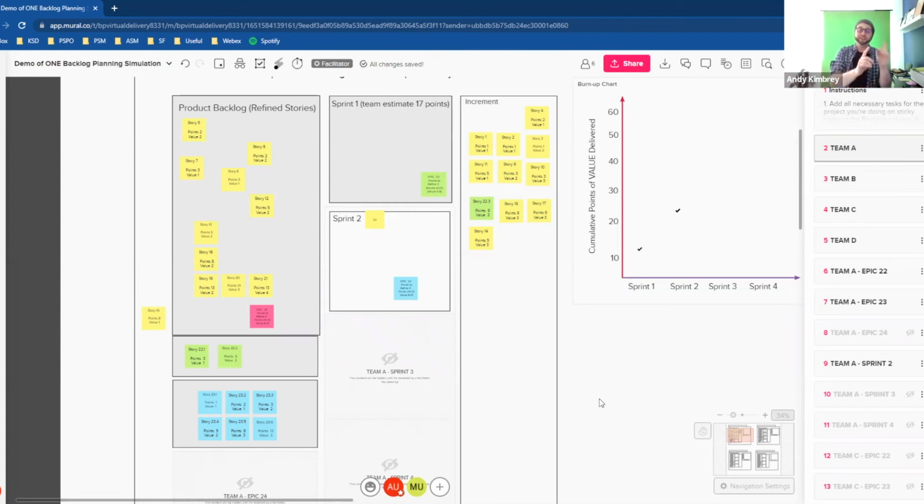That's the way that all of the Scrum events would work: you wouldn't just increase the time box for one sprint, for example. When you make a change, it changes going forward until you need another change or have another consensus. Or if they feel like this is really easy, which has happened before with us, I think me and you, RT, were doing this once, when they said, we only need 8 minutes. Some people said we'll keep it at 10, some people said we only need 5. So we said, okay, let's go 8 minutes. Is everybody okay with 8 minutes? And we adjust it to 8, and it's stuck for 8 for the next 4 sprints.